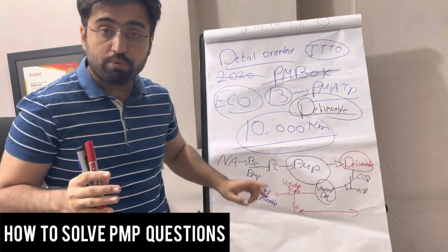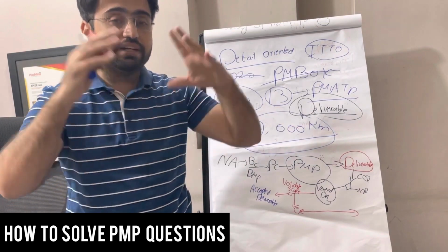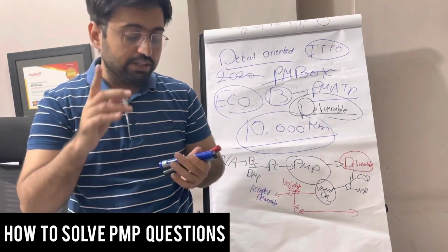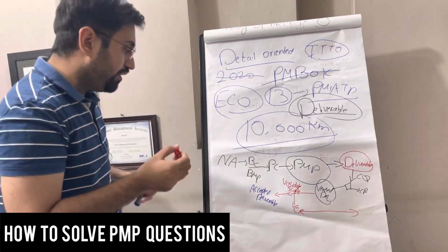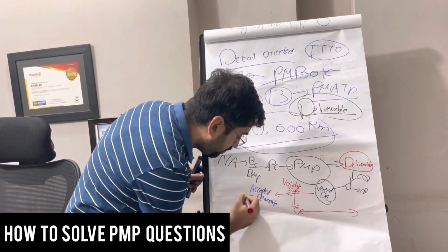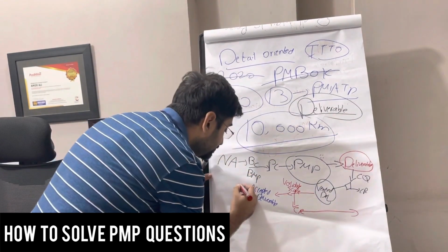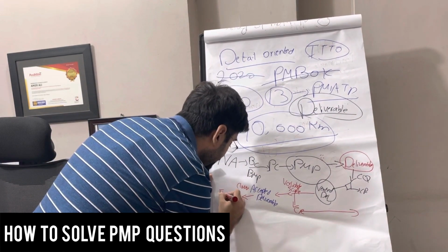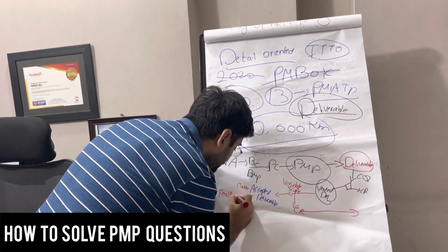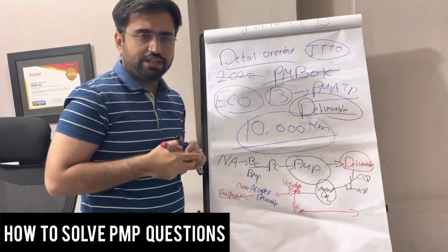This is also a formal process, we can get a sign from the client, but we also need the entire deliverable accepted by the client. So all these accepted deliverables now go to the final process, closing, and it becomes the final product, or transition, or upgrade, whatever was agreed.